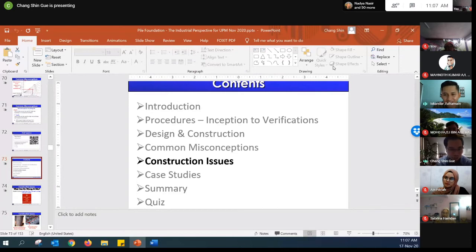Okay, my question is, if we choose the pile, how can we know the price? Because we need to do the estimation of the cost. Yeah. So the cost is another thing. Of course, in practice, we also do quantity takeoff. I'm not too sure how much you learn in your university. That means there's a fixed cost for concrete volume, your reinforcement.